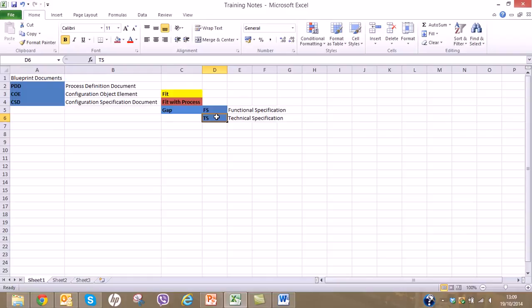So everything which you do on the system, there should be an evidence in the document. Even the small change you have to do in the system, first you have to go and write it into the document, then change it. Otherwise this is wrong. You will be against the standards and guidelines of the implementation project. So these are the standards and guidelines to write these documents and then make changes.